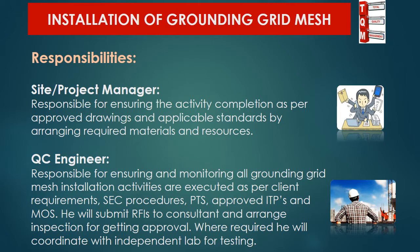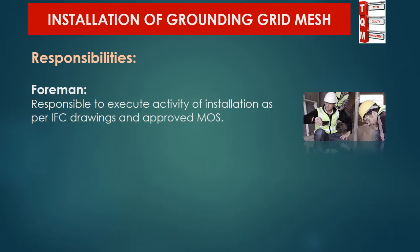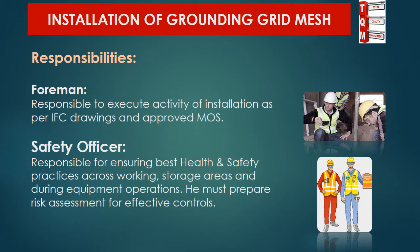The QC engineer will follow Saudi Electricity Company procedures, PTS, and approved IDPs. He will submit RFIs to consultants and arrange their inspections in order to get work approval, and where required, will coordinate with an independent lab for testing. The foreman will be responsible to execute the installation activity as per IFC drawings and approved method statement, and will be the key contact with the site manager or engineer for materials and resources.